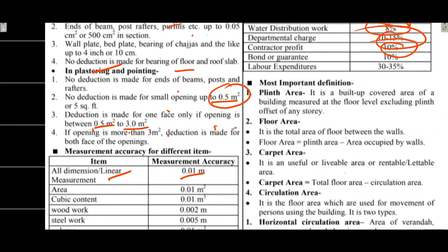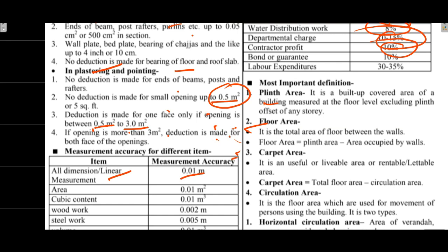These definitions are important. Cleaned area is the built-up covered area of a building measured at the floor. This is plinth offset. Floor area is the total area between the walls. The floor area is less as compared to the plinth area. Carpet area is the usable area and livable area or rentable area.